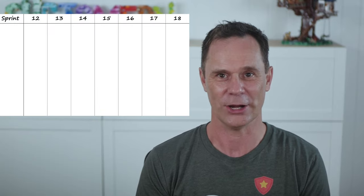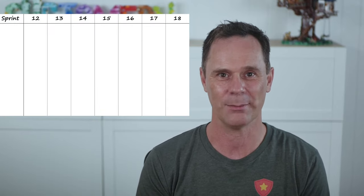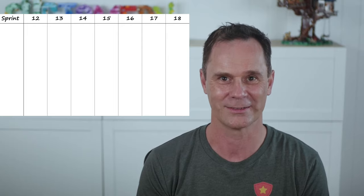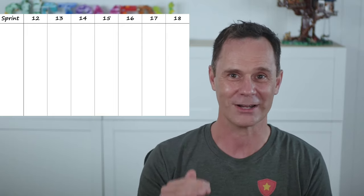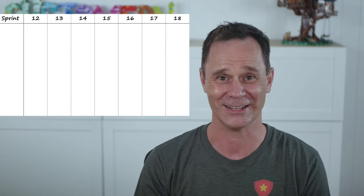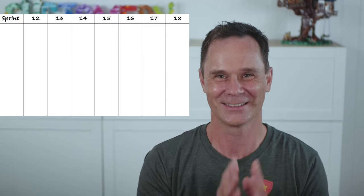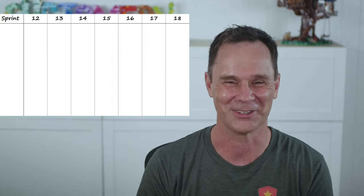The first step in our cross-team refinement board is to draw a timeline of our upcoming sprints. You could draw them vertically, progressing down, but this isn't TikTok, so my timeline is horizontal.